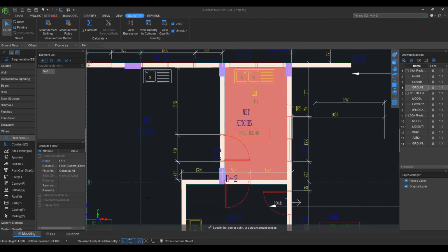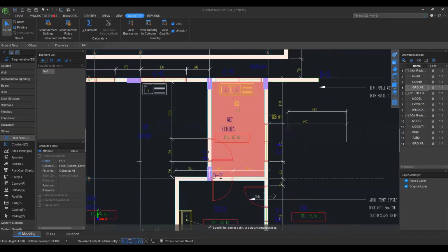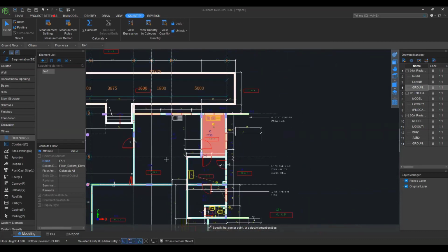Yeah, for the area, what we usually need to do when we get a project, whether from a consultant, being a contractor, or doing some high-level cost planning exercises, is generate what we call a gross floor area schedule. That would involve basically taking everything inside the external walls, loosely speaking in terms of the definition. And if we have a multi-story building, how does it work? Is this just a case of extrapolating what you've just done there for the kitchen?